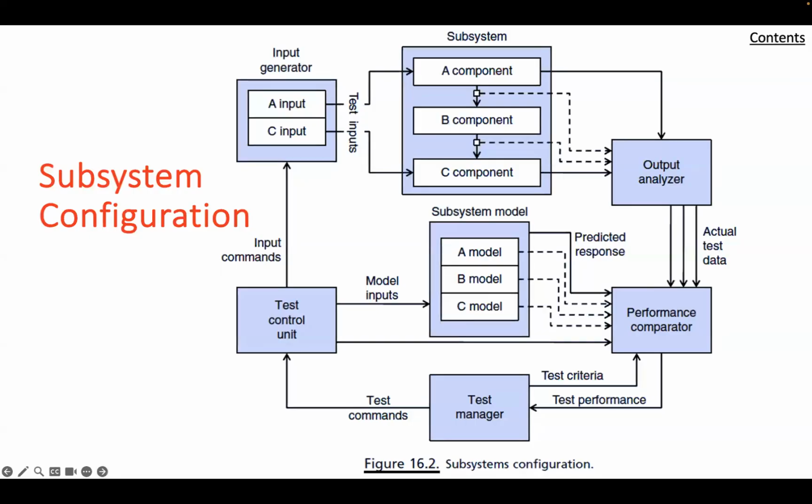Well, as we're doing system integration, the first thing that we have to do leading up to that is subsystem integration. So we'll look at this figure and talk about this before we get into the next level. As noted previously, the integration of a subsystem from its component parts is normally a stepwise assembly and test process in which parts are systematically aggregated and the assembly is periodically evaluated to reveal and correct any faulty interfaces or component functions as early in the process as is practical.